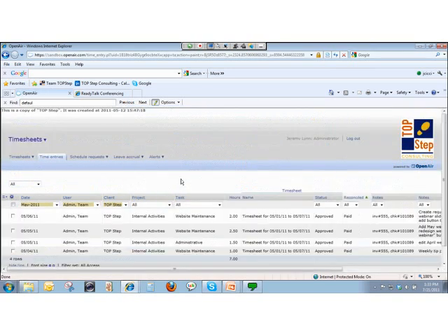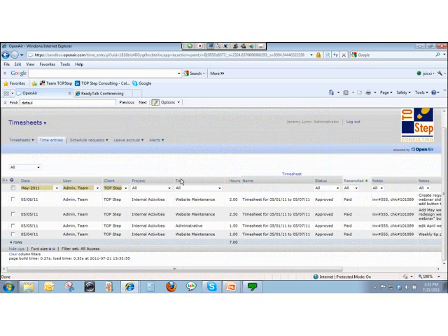So now from a reporting perspective, I know what has been worked, so from a cost accrual perspective. I know what's been invoiced but maybe not paid yet, and now I also know what's been paid. So I sort of know all 3 areas. Work that we've committed to pay, work that we still need to pay because we've been invoiced, and what has actually been paid. And all of that by just using these features in the Time Entry tab.